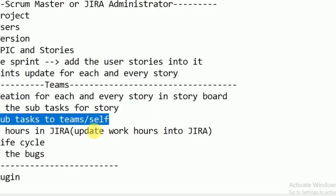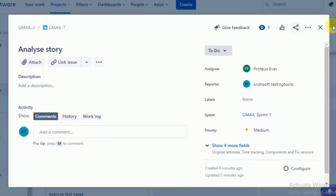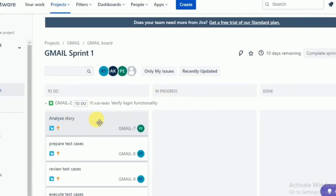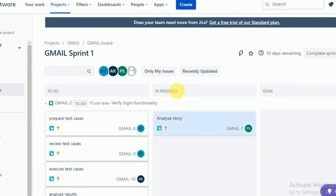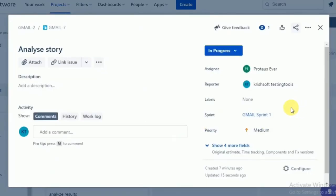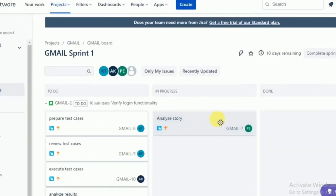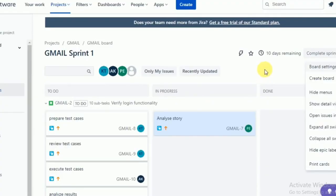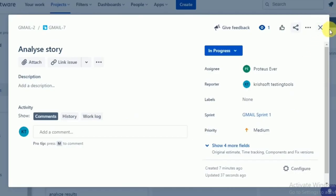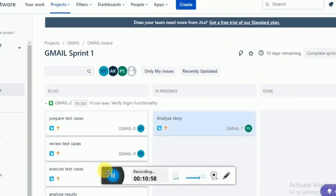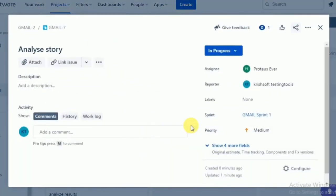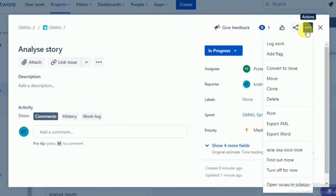Now, burning the hours — how to update work hours in Jira. For example, you are doing 'Analyze Story' and it is in progress. How many hours have you done? Double-click on it and in the dropdown you can find 'Log Work.' Daily, in the agile model, the deliverable hours are six hours — remaining two hours are for meetings. So six hours you need to burn daily in Jira, because it is helpful to the scrum master to generate the burn-down chart.